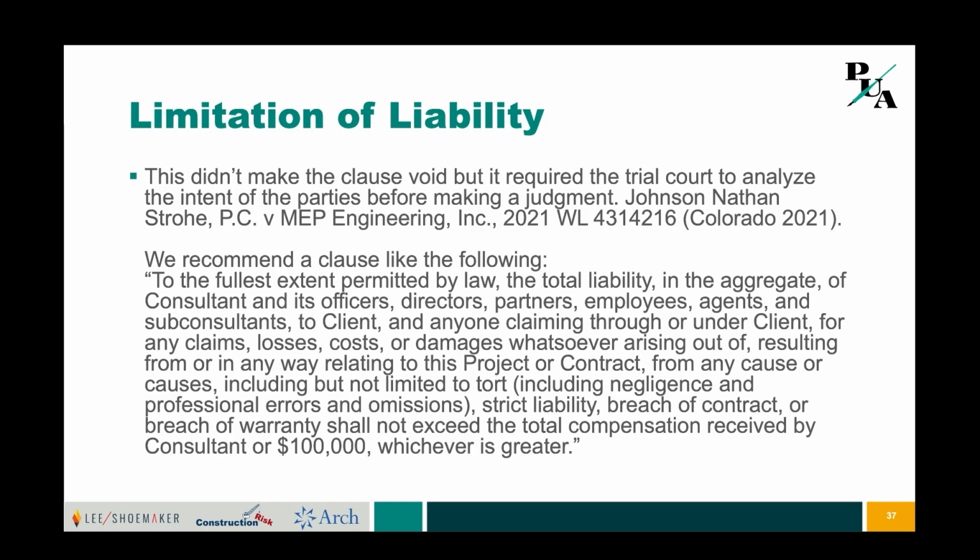critical. It's also important to know that limitations of liability, every state has a slightly different perspective on these. Most states are going to enforce them. But we've actually seen some decisions recently in California where the inclusion of a limitation of liability provision may be construed as an intention of carelessness and be construed against the design professional in some way, shape, or form. So it's always important to understand the law of the states in which you're working when you're entering into contracts.